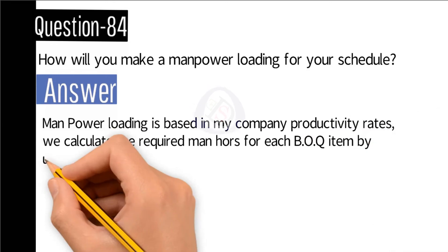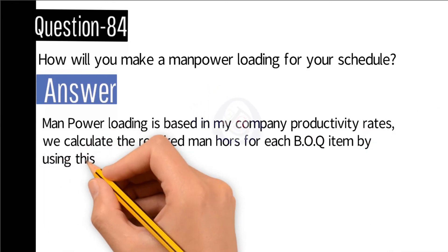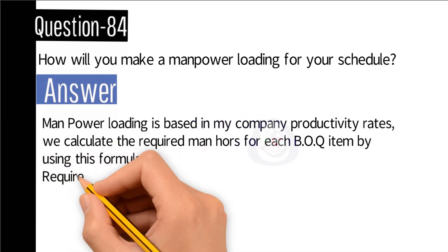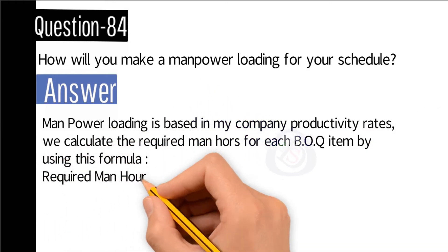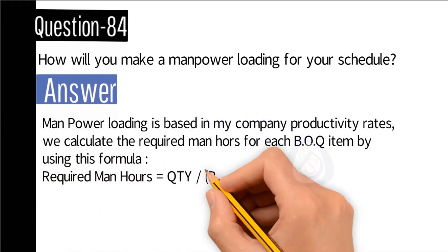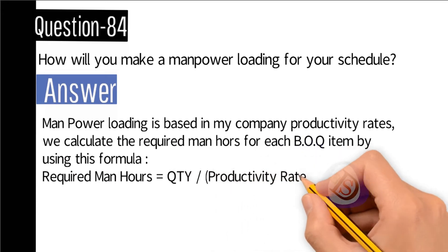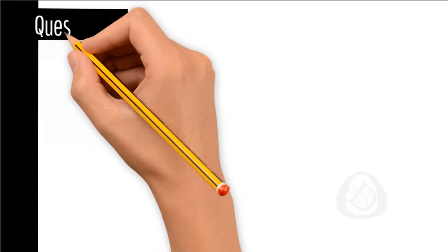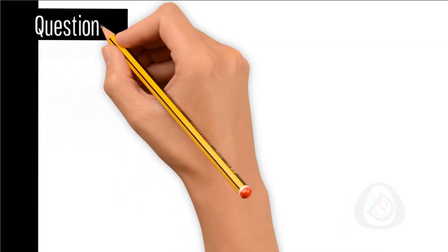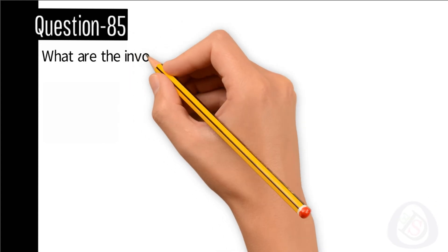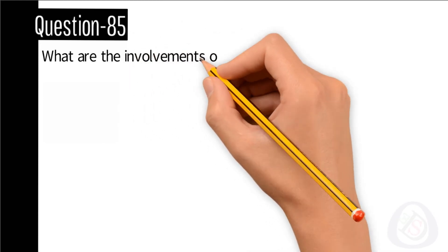Required man-hours = Quantity ÷ Productivity Rate.